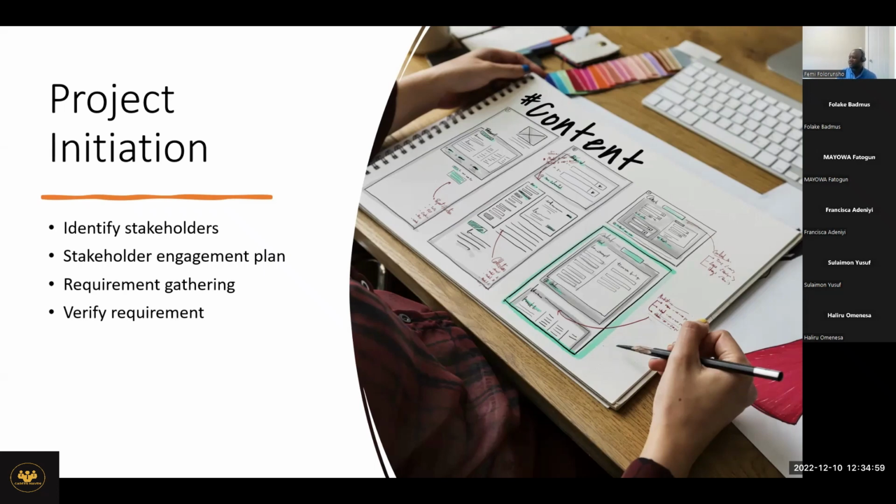Does this person like Teams meetings, or does the person just like email? So here we're able to draft a communication plan on how we want to engage with all these people, based on the RACI metrics that we've done, right? Somebody that is accountable for a particular line of operation versus somebody who is to be informed.